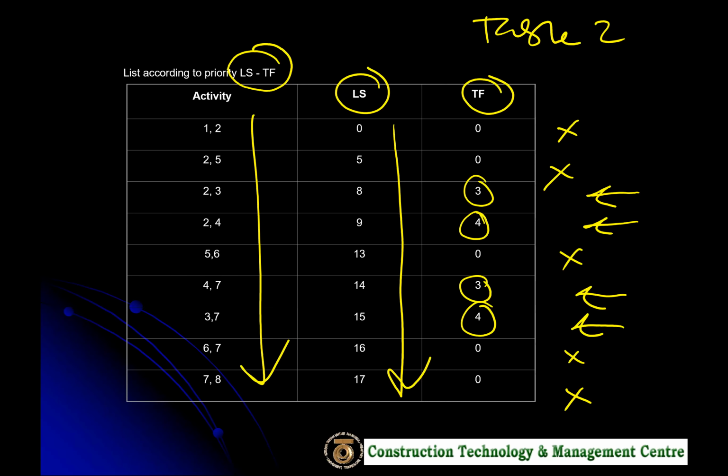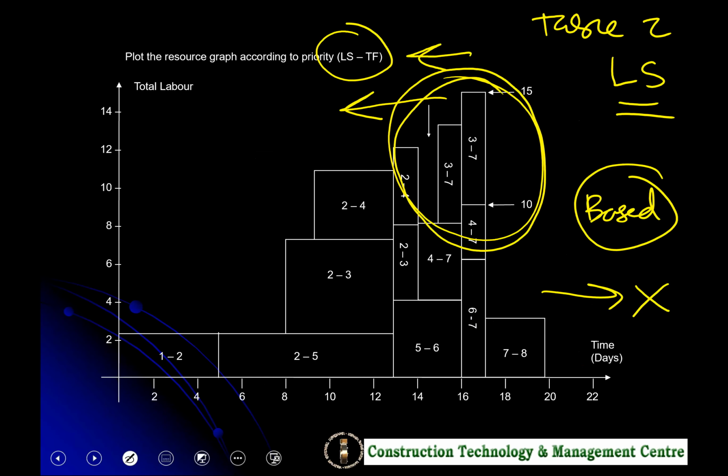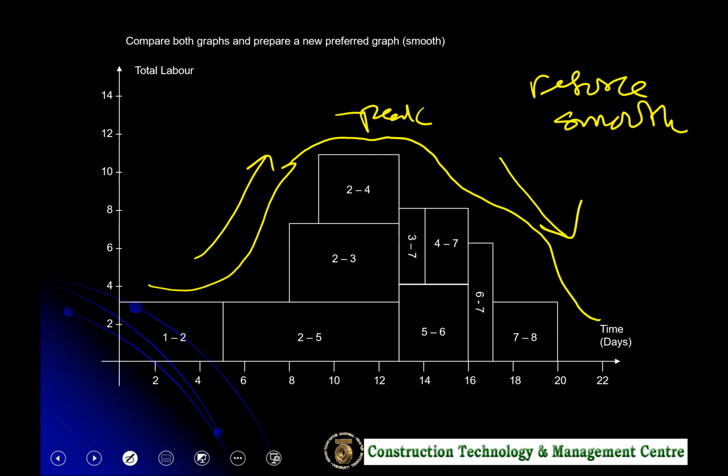And this is the concept. So meaning to say, how come we get this kind of graph is basically by using late start values, but then for certain activities we might use the early start date or in between.